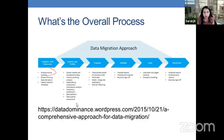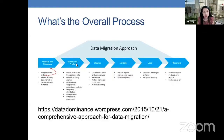In the analyze and discovery phase, we create a data dictionary of the source system — the old system where you are pulling data from. We review existing documentation and gather relevant metadata. In the extract and profile phase, we extract master and transactional data, perform column profiling analysis, assess dependencies, uniqueness, redundancy analysis, frequency distribution, data patterns, and data quality assessment.